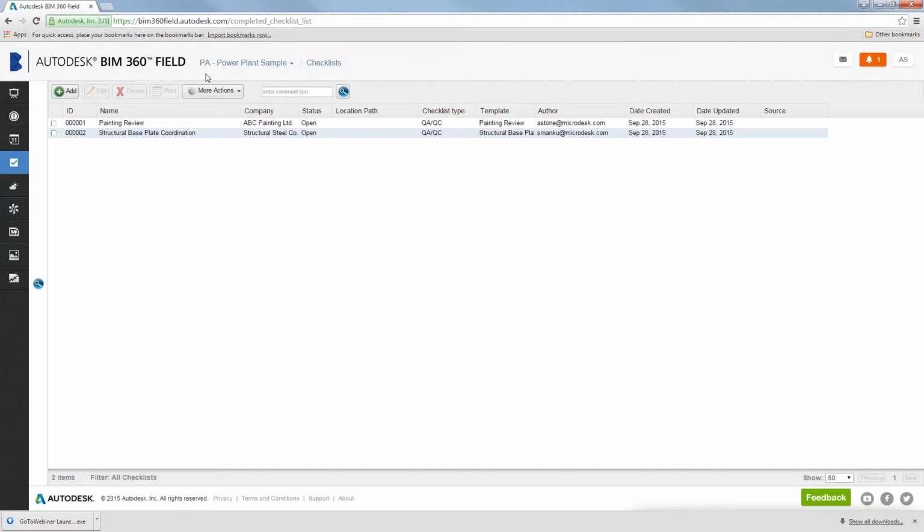And as a workflow, you actually have a synchronize button on your iPad. So when I'm back at the office, I'm synchronizing all the data before I go on site. Okay, so now it exists on my iPad. I do all my work out on site, logging all those checklists, those issues, taking pictures, putting it into that database. Technically, it exists on my iPad. Once I get back to the office or my house or hotel or wherever it is, and I have access to Wi-Fi, I hit synchronize, and it will go all up to the cloud into that BIM 360 environment and sync across.